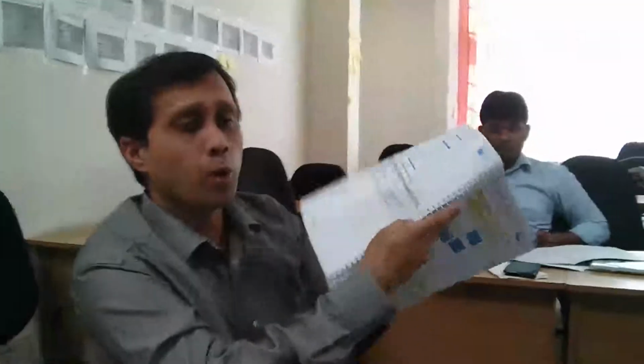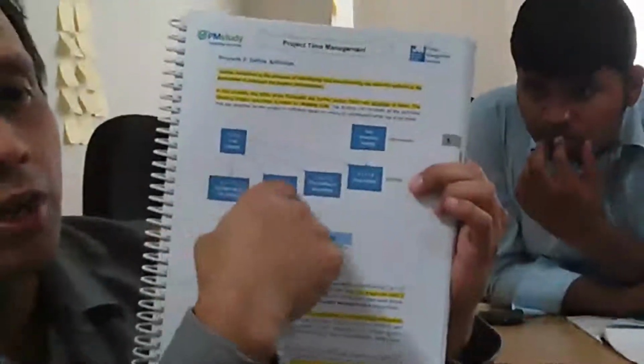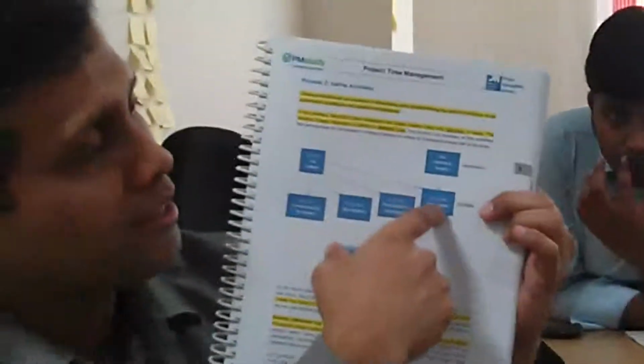And then we take it all the way through, let's say, time. So let me just show you, for example, how time looks. Do you see that 1.1.1.1 was lay cables? That was the work package. Now the first thing is we break it up into activities. Do you see these 4 activities? And we mention what the dependencies are. So we're breaking it down.